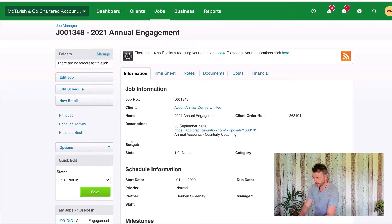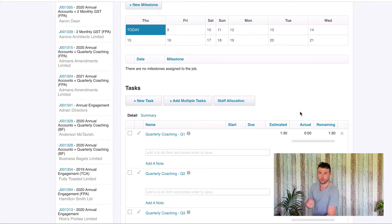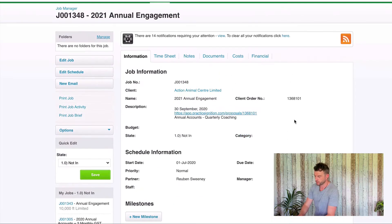What I want to do first of all is make sure I do my five checks. Those five checks are: the budget, the job category, the partner, the manager, and my estimated times — which represent the amount of work that I believe will be involved to complete each task.